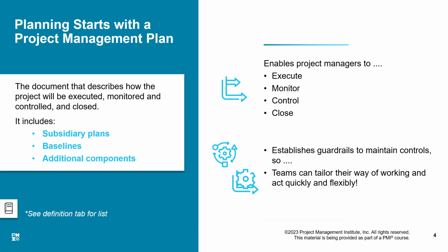One box is called the project management plan, and the other box is called the project documents. For example, you create a work breakdown structure in this process, you create a list of activities, you create a lot of documents. While you are trying to establish a schedule, you create a network diagram, you create a Gantt chart, you create a lot of documentation. All those documentation will be part of the project documents.